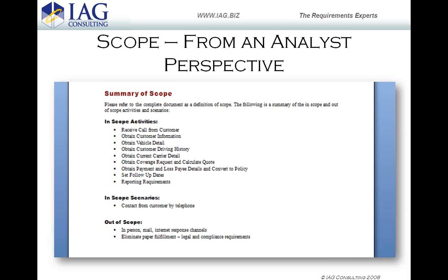That's very helpful from many perspectives, because it also makes the physical scope of the project much easier to assess. Something that somebody's bringing you is either inside the boundaries of these basic business processes or it's not. And the way we deal with requirements, they are always attached to a business process somewhere. The reason you do that is because it enables you to manage the requirements much more cleanly. If you can't manage the requirements, then you basically are losing control of your overall process. So if you can manage them more cleanly, it's because they are attached to a business process along the line. So these are the basic business processes.